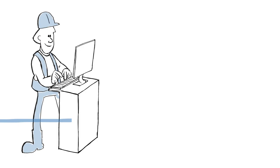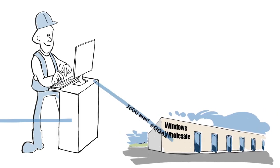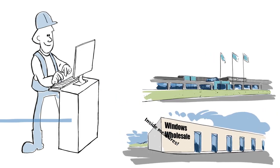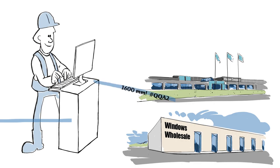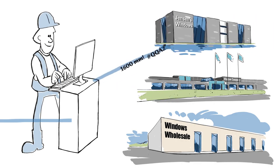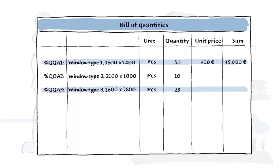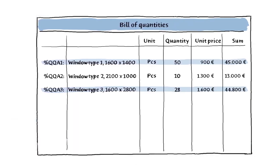When the contractor receives the material, his software can recognize the window data, and it's easy for him to search manufacturers' databases for a window that meets the specified requirements. He calculates prices and transfers them to the bill of quantities.